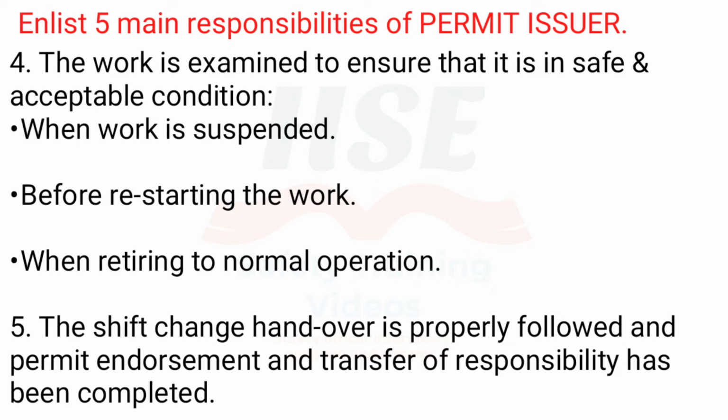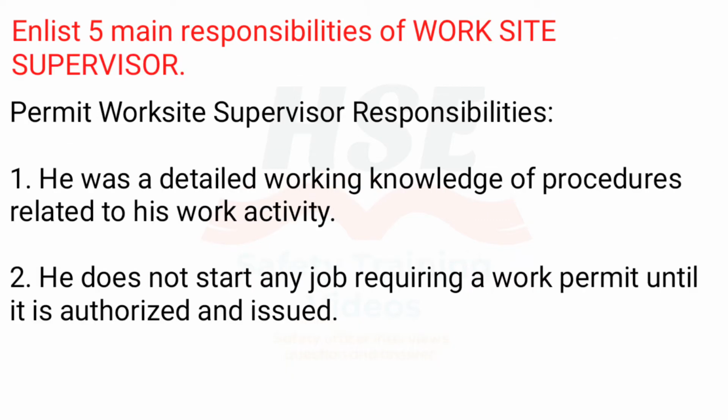When work is suspended, before restarting the work, and when returning to normal operation. 5. The shift change handover is properly followed and permit endorsement and transfer of responsibility has been completed. Enlist 5 main responsibilities of worksite supervisor.